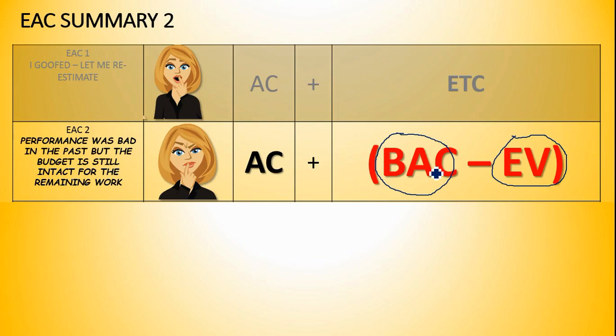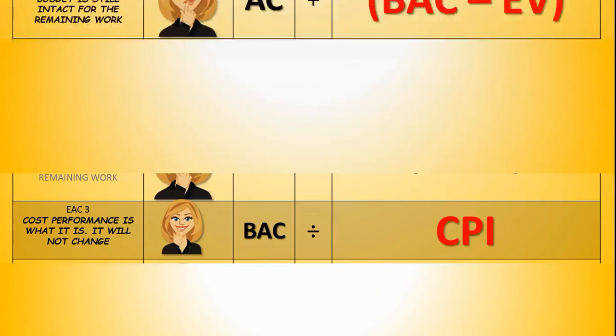You see, because the budget still stands. So the work that we've got done is the EV. Actual cost is how much you've spent. So if you add up how much you've spent, plus the total amount of the budget for the project, minus the value of the work you've got done, that will give you an estimate at completion based on the budget still being intact. You see? So that is very important to know.